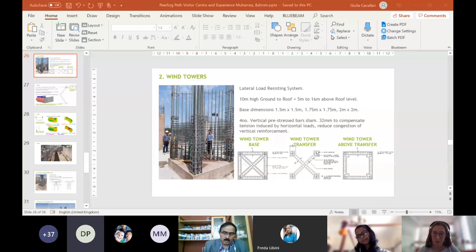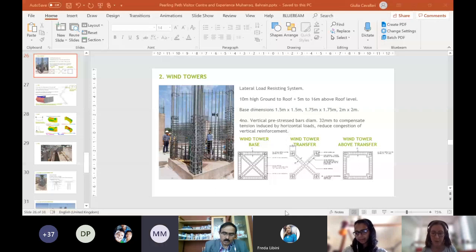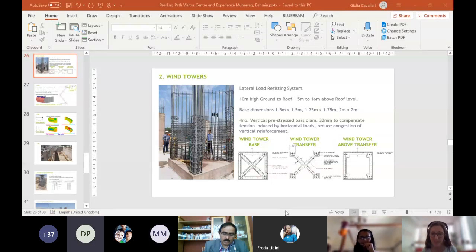Okay. I've not been in touch with the conservation team, but having a UNESCO site means that whatever is at the site before you start your construction has to be preserved. The ancient ruins that you saw at the beginning of the presentation could not be removed, relocated, damaged or readjusted. They just had to be preserved like they were found.